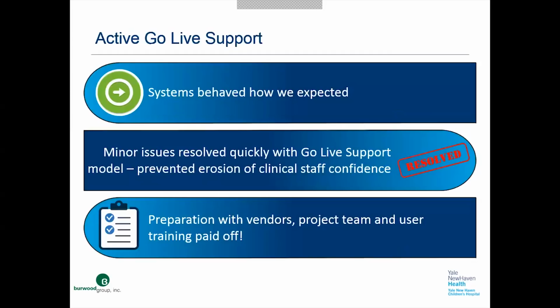Next slide. It was very important to the team and the staff to have active go-live support. This provided reassurance that issues, if any, would be addressed quickly. There were 3 days of 24-hour on-site support. The design team and NICU leadership were part of the rounding team that checked in with staff and reported issues to the command center for review and resolution.